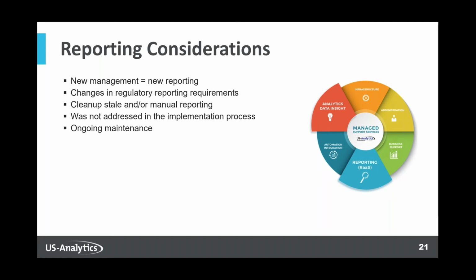So this is the reports I need to be able to get out. This is what my budget needs to look like. This is what my P&L will look like, whatever the case may be. And then I used that as a testing avenue for when I started putting my data into EPM. I could then run the report and see whether or not it was coming out the other side the way that I would like it to.